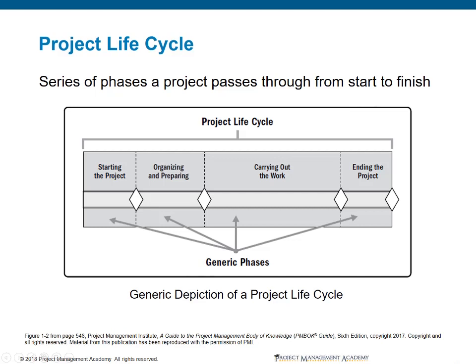Starting the project culminates at a milestone of having the charter prepared. Organizing and preparing culminates with the signing of a project management plan. Carrying out the work will end once we have an accepted deliverable, and ending the project will be complete when we have finished the final process of close project or phase.